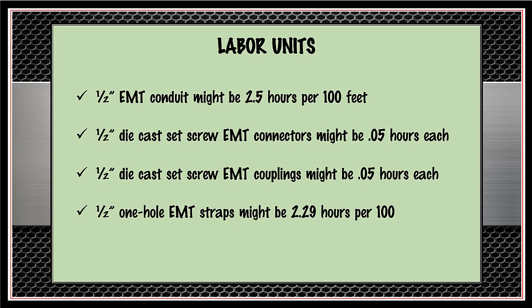Half-inch die-cast set-screw EMT connectors might be 0.05 hours each. Half-inch die-cast set-screw EMT couplings might be 0.05 hours each. Half-inch one-hole EMT straps might be 2.29 hours per 100. You may have noticed that I said "might be" for all the examples I listed.